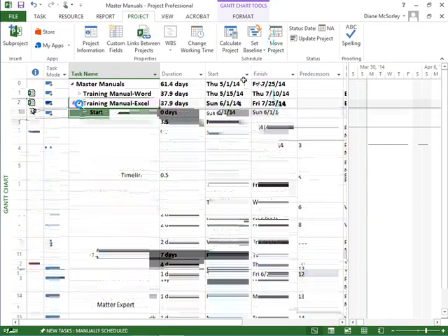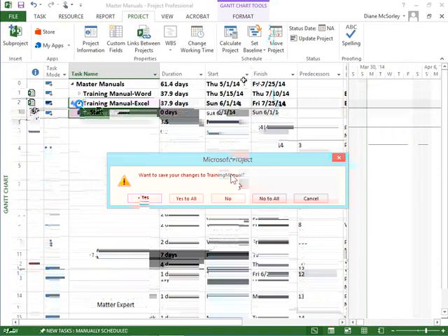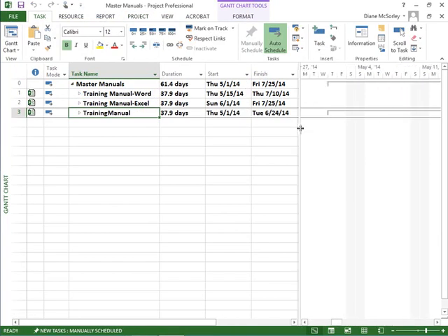Total. So they're all listed here. They are linked as sub-projects. There's the indicator to let you know. Let me save. And I'm saving the connection. And again, I have the ability to make changes in any one or all of the plans, and the changes will go back out to those individually linked plans. This is a nice way to manage those multiple projects, I gotta say.